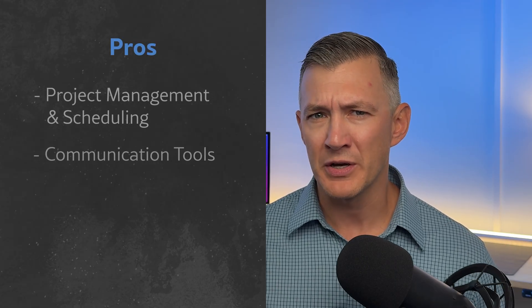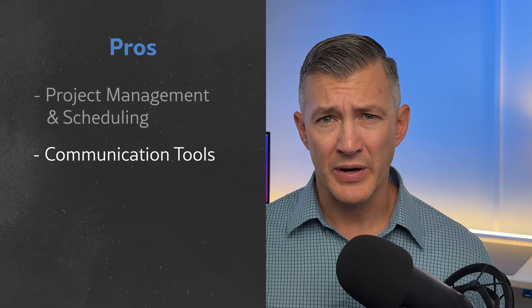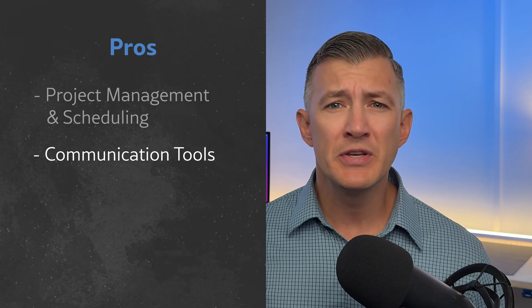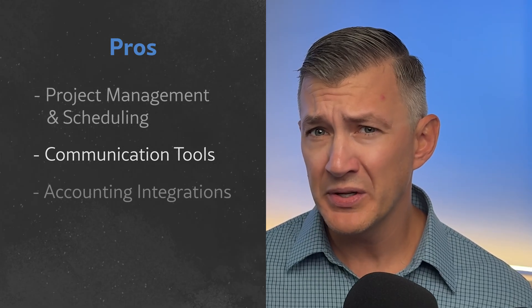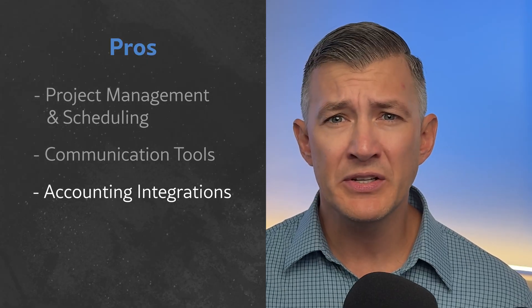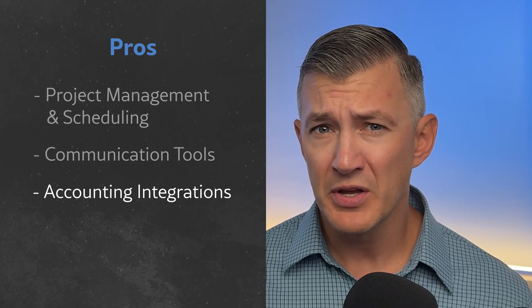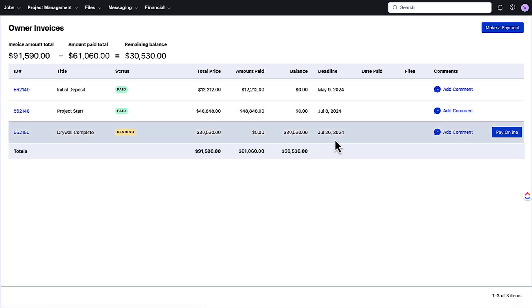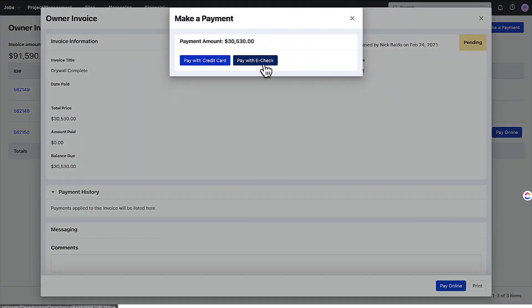Communication is also a huge positive for Buildertrend. They have portals for both customers and subcontractors. Built-in messaging, digital signatures, and proposals keep everyone aligned without daily office calls. Another positive is its finance module and accounting integrations. You can build detailed project budgets using cost codes, track committed and actual costs, manage purchase orders, and create various reports. When it's time to get paid, you can generate invoices and even accept online payments directly through the platform.